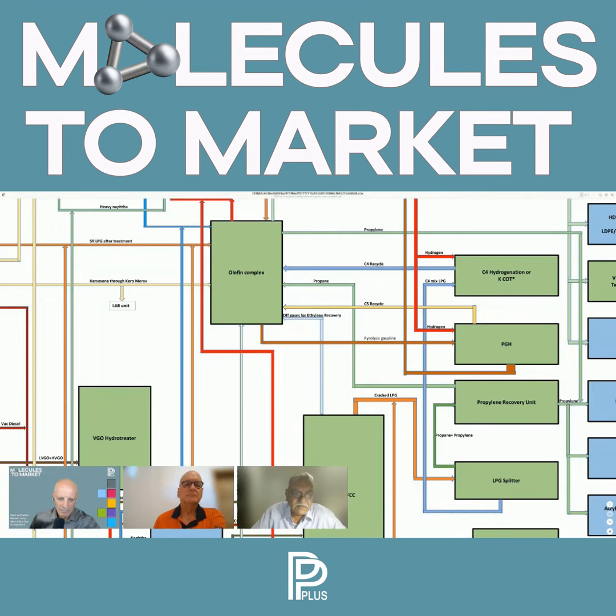So all these things are accounted for to come to a bottom line number on which we always put some contingency. So in the initial stages where the level of detailing is not that high because I don't have that level of detail, there is a certain contingency which we consider at the bottom, which is also an announced number to the board as such. And with that, we arrive at the bottom line costs.